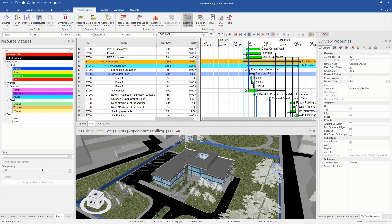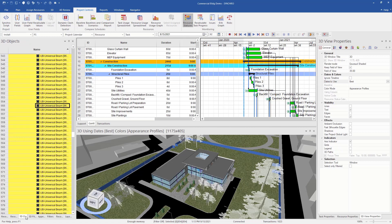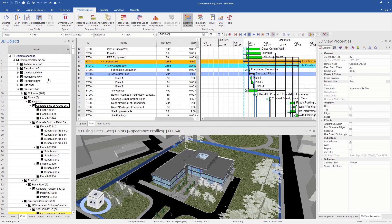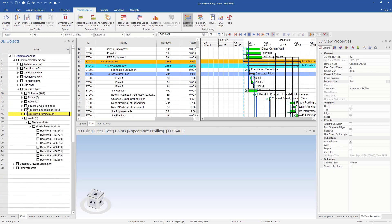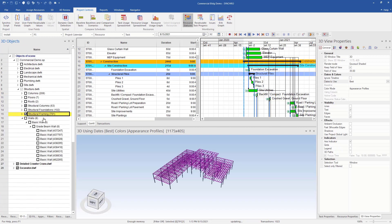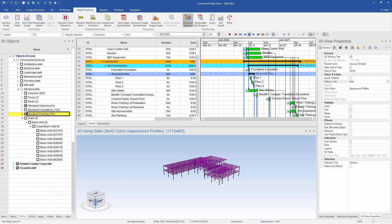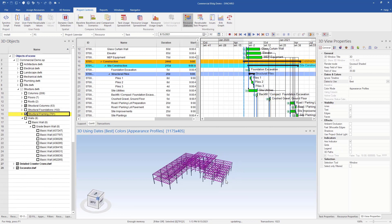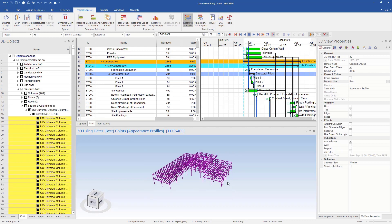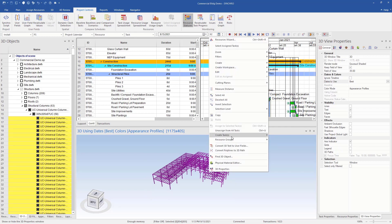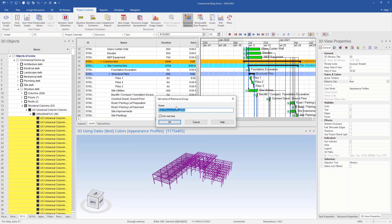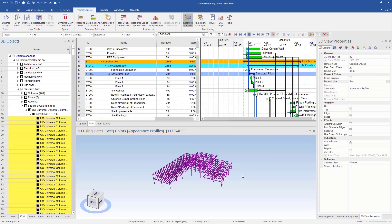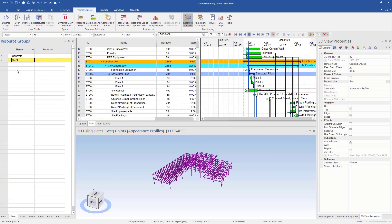So the next thing we want to do is create resource groups. To do that, we'll go to our 3D objects and we can filter down to what we want. So I'll select all my columns and framing and now I have all my steel. So I can select everything, right click and go resource groups, create resource groups. So I'll call it steel. So now when we go to our resource groups, we can see we have steel and we have concrete.